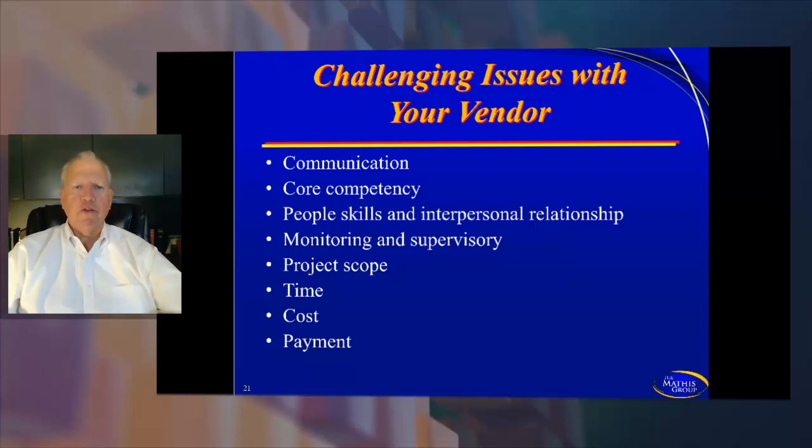Challenging issues with your vendor. A lot of areas can become challenging. If we don't do a vendor orientation, these things will come up. Let's start with the first and the most common, communication or lack of communication. In projects and with your vendor, to set it up to where you talk with them, do a conference call or a video chat weekly or bi-weekly is very important. Every Thursday at 2 o'clock, you do a video chat with your vendor. And that does not take away from you talking with them throughout the week.